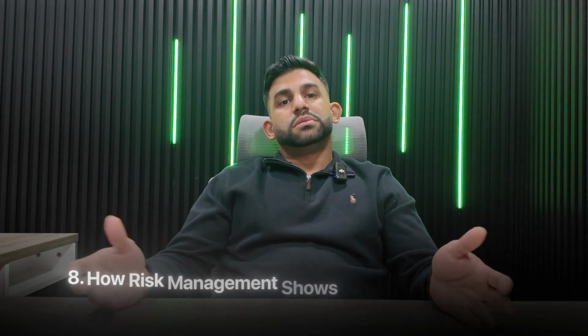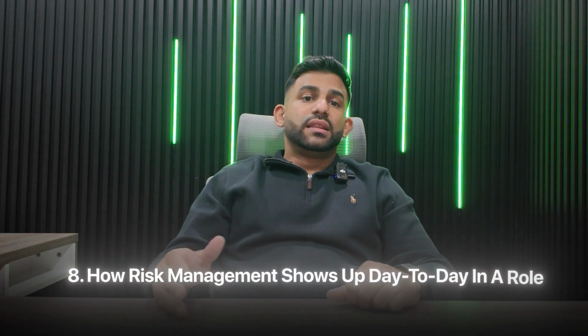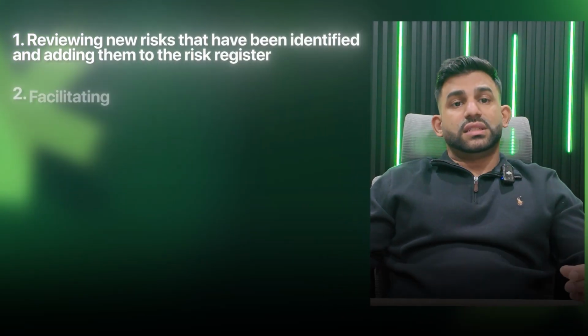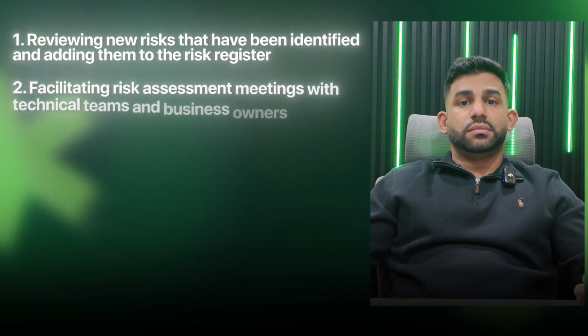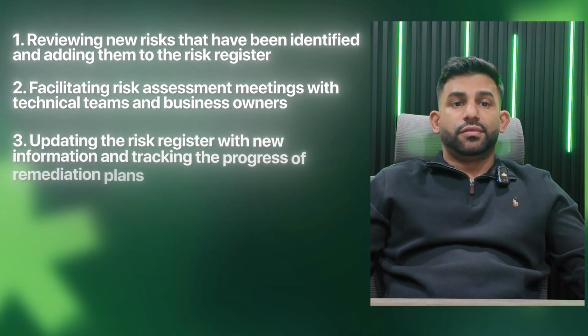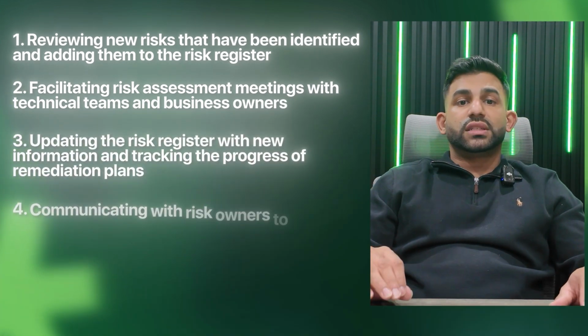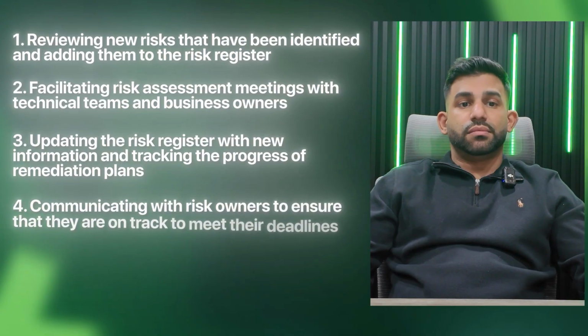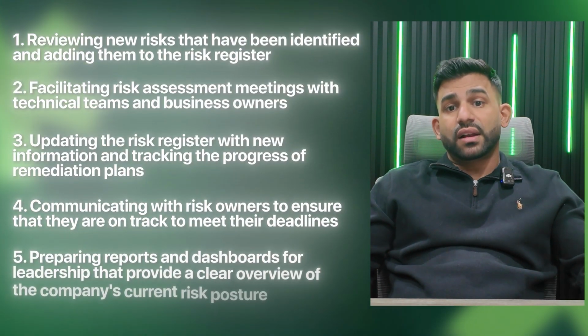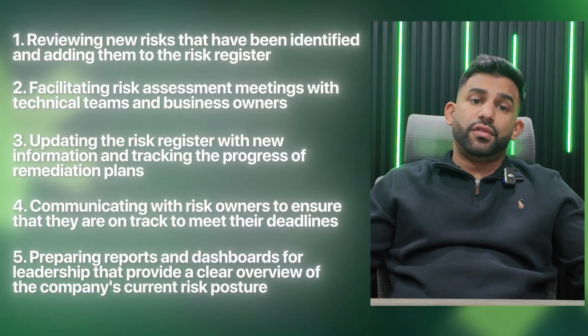8. How risk management shows up day to day in a role. A day in the life of a risk analyst involves reviewing new risks that have been identified and adding them to the risk register, facilitating risk assessment meetings with technical teams and business owners, updating the risk register with new information and tracking the progress of remediation plans, communicating with risk owners to ensure that they are on track to meet their deadlines, and preparing reports and dashboards for leadership that provide a clear overview of the company's current risk posture.